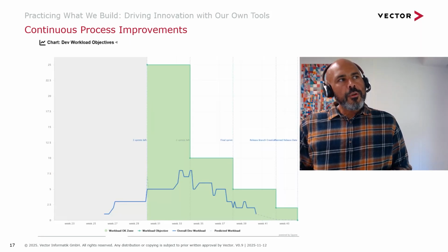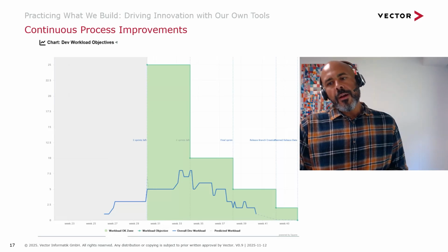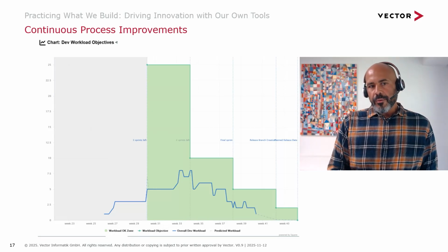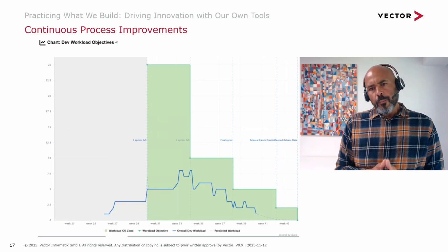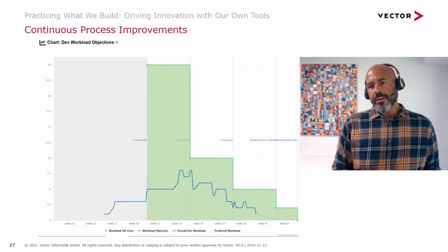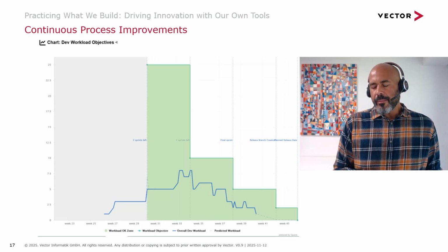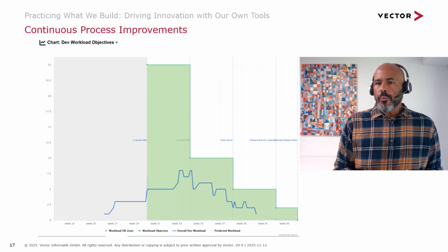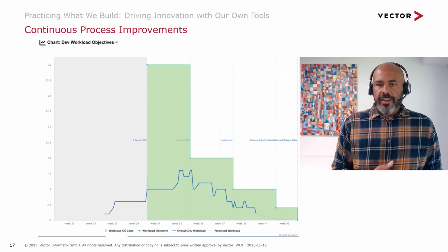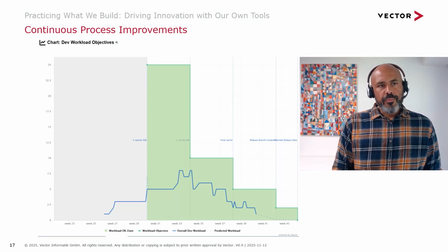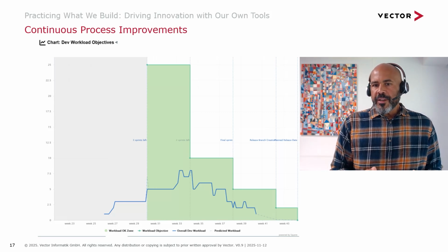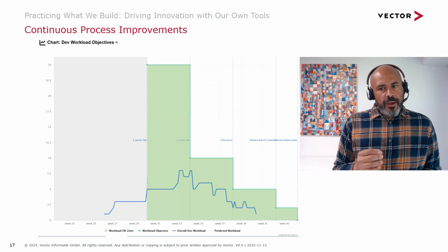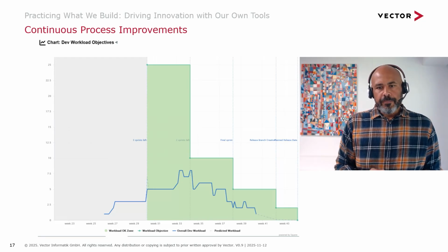And then the more you learn from your history, the easier it becomes to set milestones and goals for your project. And that's also something that uses data from various platforms in a smart way. So we follow the team workload, and we ensure it remains manageable based on where we are in the project timeline. This is something you can represent graphically as well, which is nice. So you make sure that the information comes across. And you can also add predictions that are based on your past history.